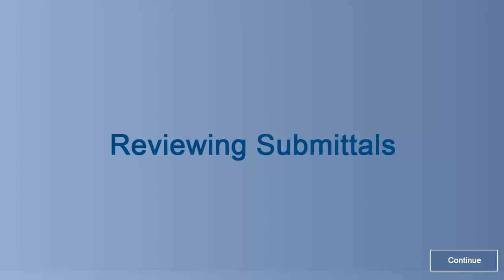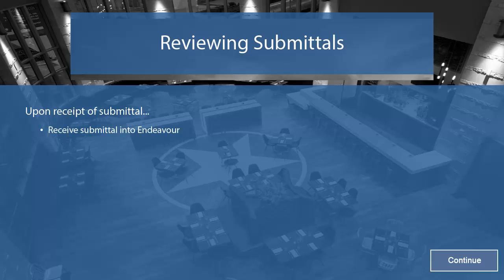Click Continue to proceed. After receiving the submittal into Endeavour, you will then thoroughly review the submittal for accuracy and completeness, to see if it is compliant with the drawings and specifications. The VCC submittal fact cover sheet, which the subcontractor should have provided with the submittal, can serve as the starting point for the submittal review.